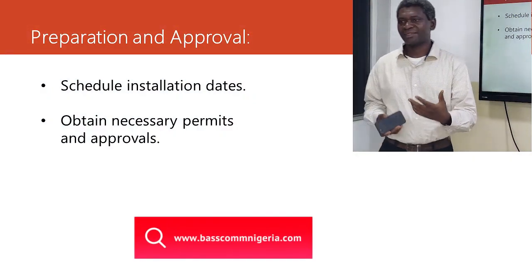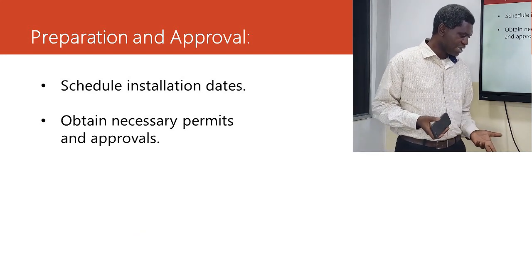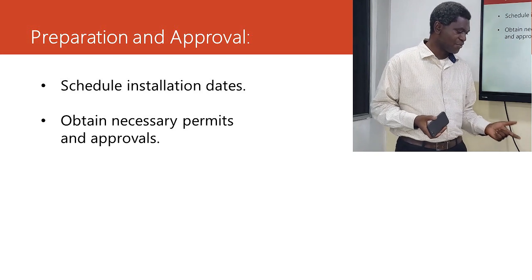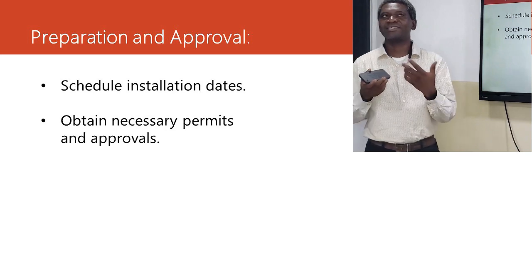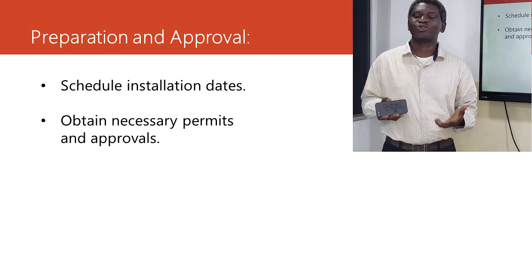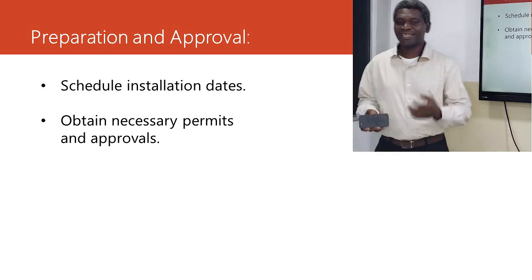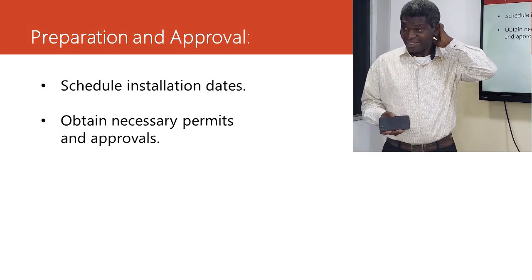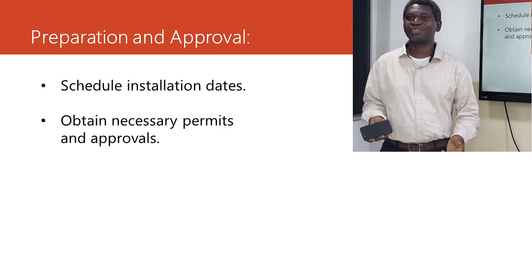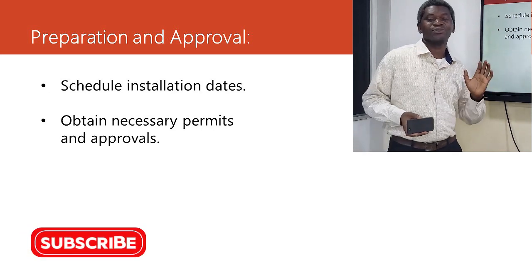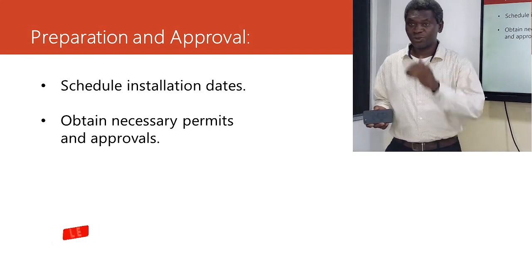So you prepare as you are going to schedule the installation, and obtain the necessary approval and permits. Some sites you might need approval, you might need permission. It's not when you take the equipment to the site that they now tell you, okay, you didn't tell us that you are coming, we didn't plan for you today. So all the fuel that you bought to go there is gone.